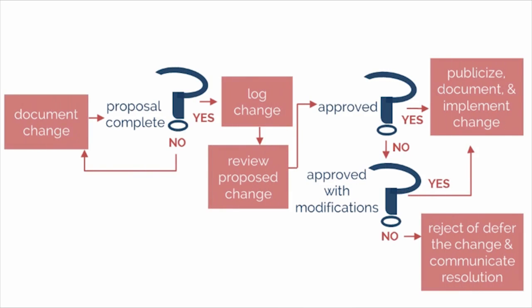There are a few things to remember about how change should be handled. If it is a small change, the project manager will need to document it, get a sign-off from the customer, and then approve the change. If there is a major change that could significantly impact the project, the project manager should go through the entire perform integrated change control process. Whether a small or large change, change control is never an informal, but always a formal process with proper documentation required for approving changes.